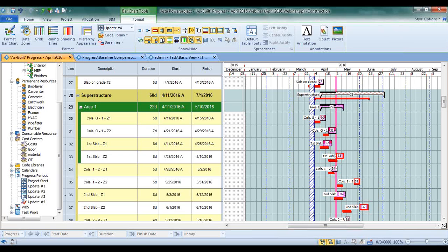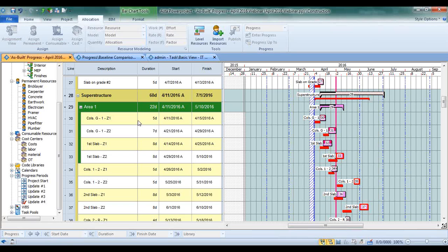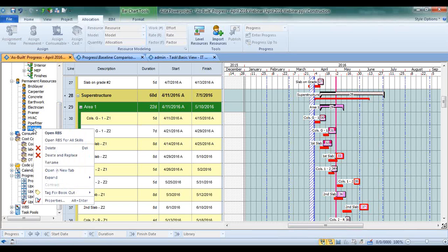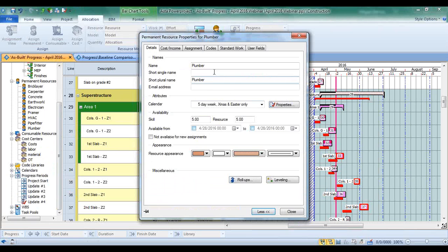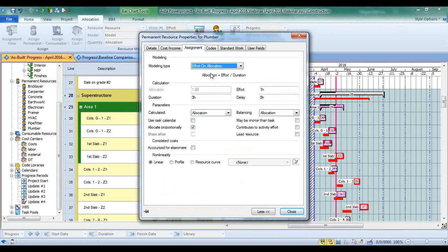Can you track manpower in a project to track duration? Can you enter manpower? Oh, yes. When you are resource loading your schedule, you can change the way that the resource is modeled. If I look at my properties, it shows the calculation. Right now it is using the man hours and the duration to calculate my number of people, but I can change that to my calculated parameter here.